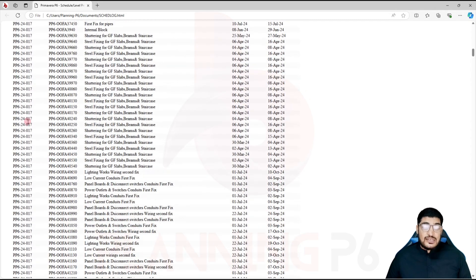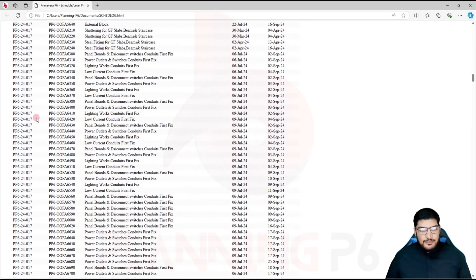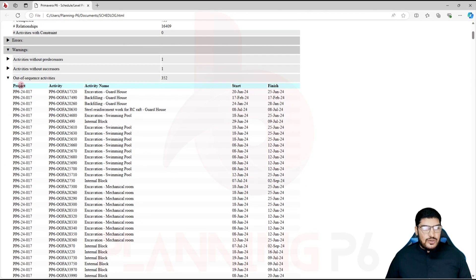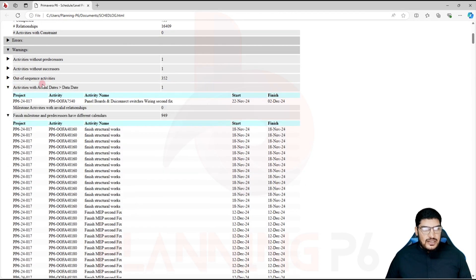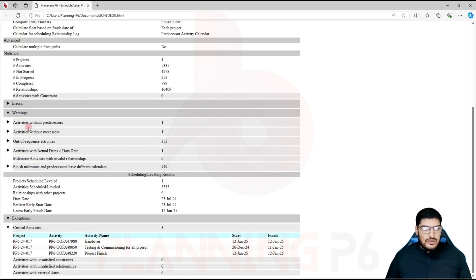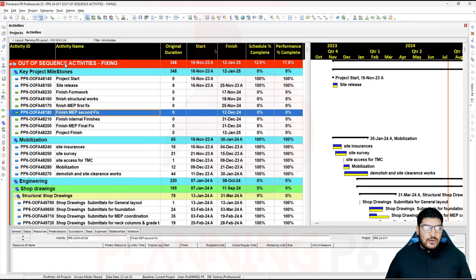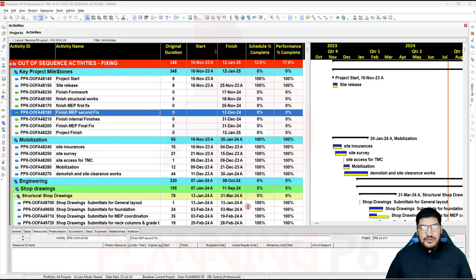You can see the activity IDs listed there — you can copy and paste from here into Excel as well, or print from this report. So out-of-sequence activities total 352, with actual data date. Now I will close this and move back to Primavera. I will export the file relations, put them into our sheet, and explain how fixing will work — there are different scenarios, some true and some false out-of-sequence.